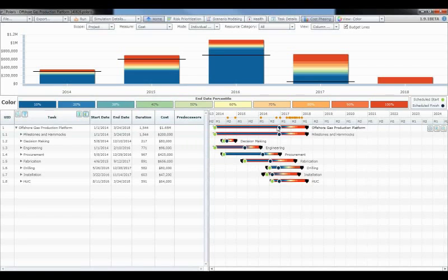So it's saying, okay, my plan schedule is kind of sitting in this blue area. Well, that's in the 10% confidence level. Very, very low confidence that I'm probably going to meet schedule on this project. And as I go further and further out, that confidence level goes up. Where we'd like to see this is hypothetically over here, or really we like to see the higher confidence levels over here in that kind of intake here.